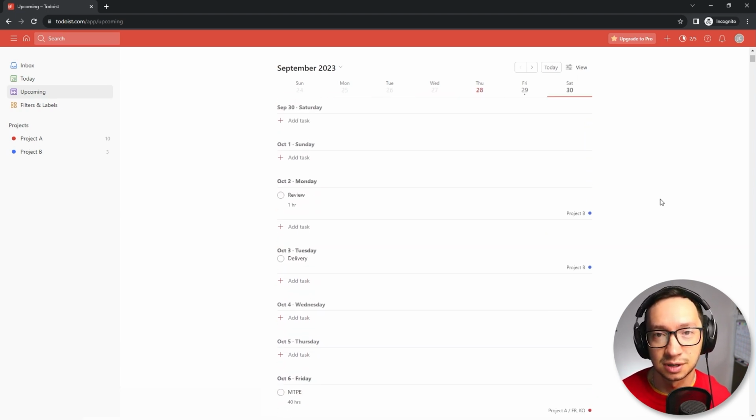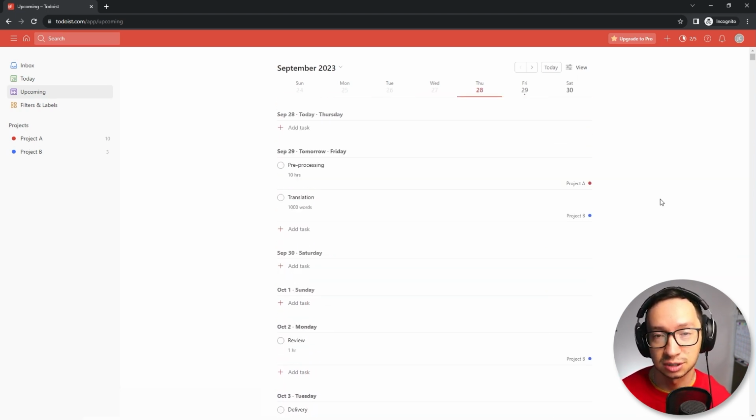Now, I definitely prefer to have a Gantt chart or one consolidated view of all the projects and all the tasks, because it's very visual and I like it. And in all of the tutorials, that's what I'm suggesting that you use. But in this case, we don't have a Gantt chart because we also don't have a start date for the tasks. So we don't know when they start, when they finish, and what is the duration. We only have the due dates.